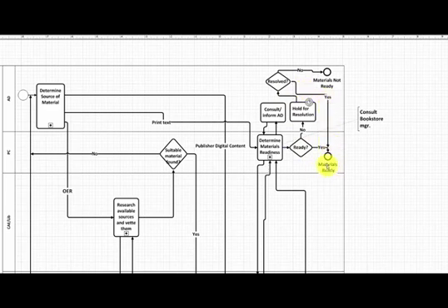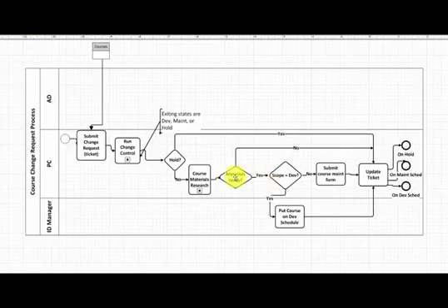Materials are ready. When course materials research concludes, if the materials were not found, the course change request will be placed on hold. If the materials are ready, the course will be placed either on the development schedule or the maintenance schedule, depending on how it was scoped during the change control process. The change request will be updated to either on maintenance schedule or on dev schedule.